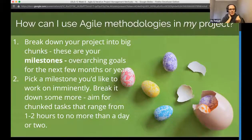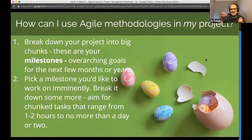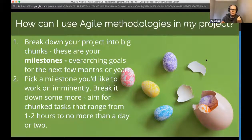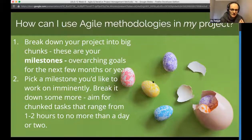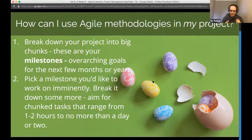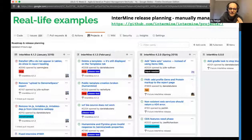So how might you use this in your project? The idea is you have a large milestone — a large main goal — and then break it down into the smaller chunks and tasks you want to work on. Try to get those tasks to be between one and two hours to no more than a day or two. If it's going to take more than a day or two, that's a good indicator you can't estimate how long it'll really take, because it's comprised of so many things you might be forgetting some. It's always better to break it down until you can easily estimate how long each part will take.